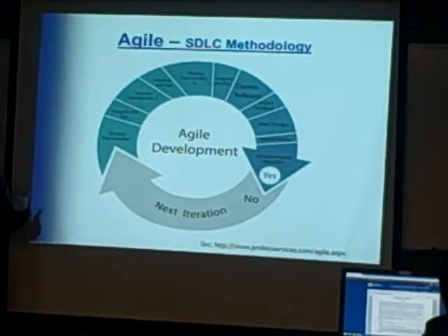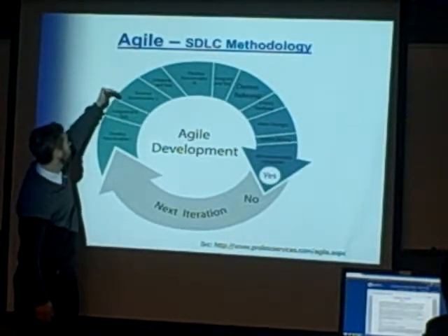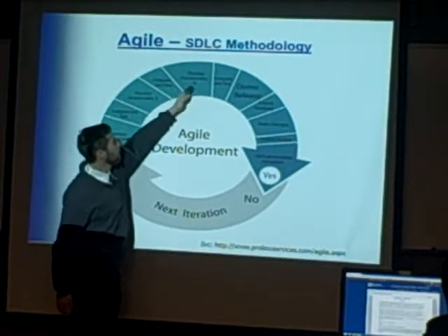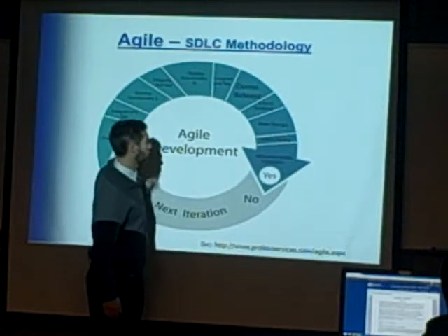So they're saying, hey, let's get your course correction 1 month in, rather than having it fail 5 years down the line after you spent $300 million. Anyway, this one says you develop functionality 1, test it, develop 2, test it, and in a very short amount of time, you demo the release, get their feedback, and then start all over again.